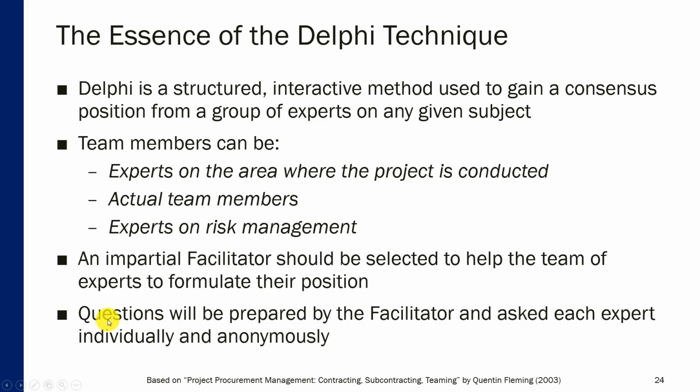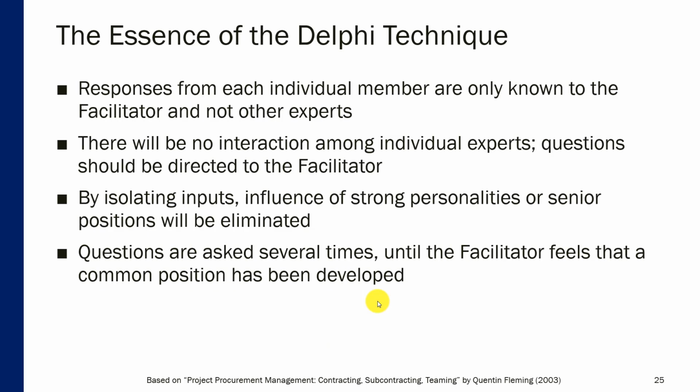Like, for example, questions can be in relation to work items in the work breakdown structure. For every work item, a facilitator can ask, so what are the negative things that can happen in relation to this work item? What are the things that can go wrong? So there's some preparation involved on the facilitator side to get the discussion going.